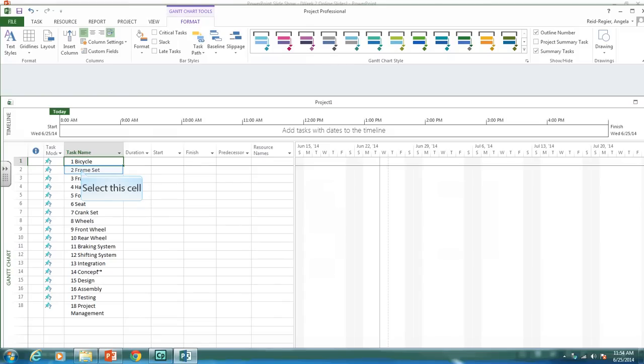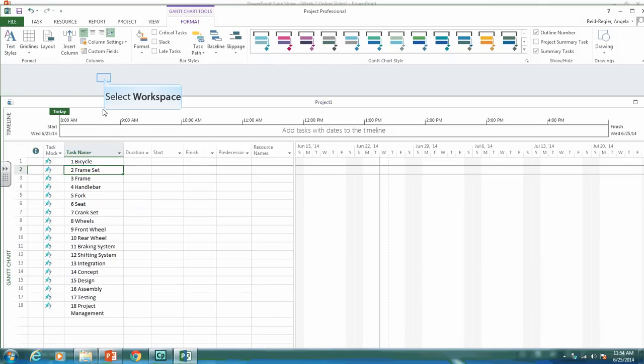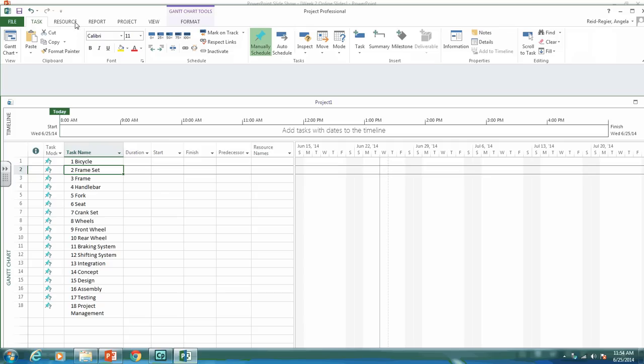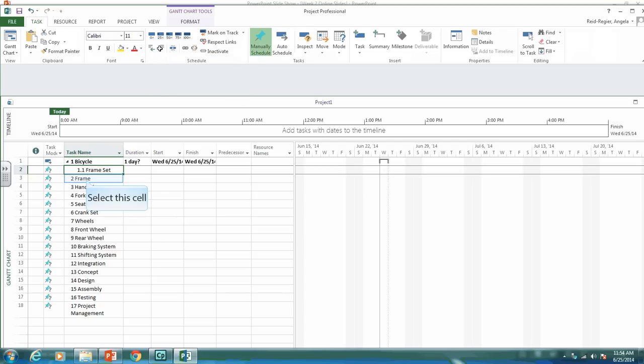So the bicycle was 1, that's good. But we want the frame set to be 1.1. So what you need to go is back to the task tab, and we're going to indent it. And as you can see, we now get the frame set.